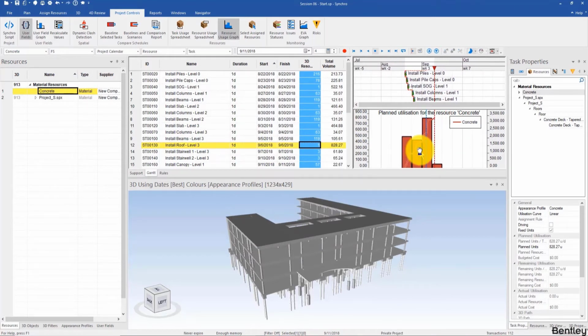You can of course have multiple resources assigned to those tasks, but eventually what I'm trying to get is that you can assign those quantities, those resource units, quickly. In the past, people tend to key in those numbers one by one, but in our case, we actually got those numbers from the model and then we run a script and then quickly assign the plan units.